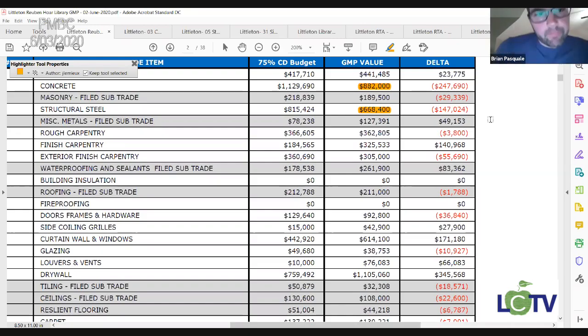Right. Where I've gotten burned before on that, John, and I just want to make sure, I'm sure they're making the plumber own his own core drilling of the slab to put a pipe through. But if the concrete guy has to change his rebar layout and add rebar or add pour stop or edge stop around penetration, that's where you get concrete. Good point. Okay.